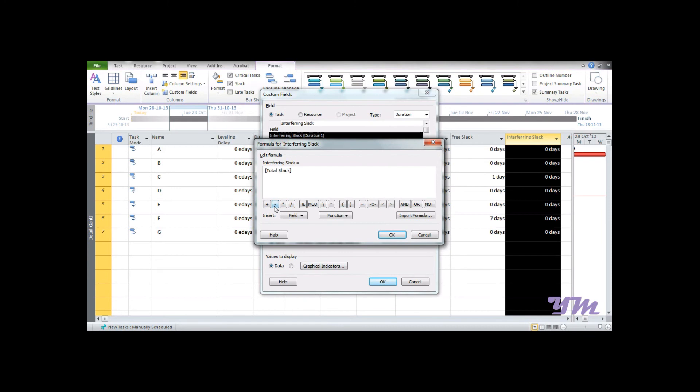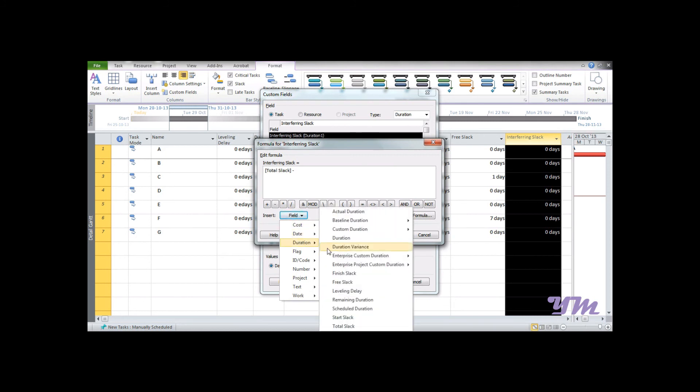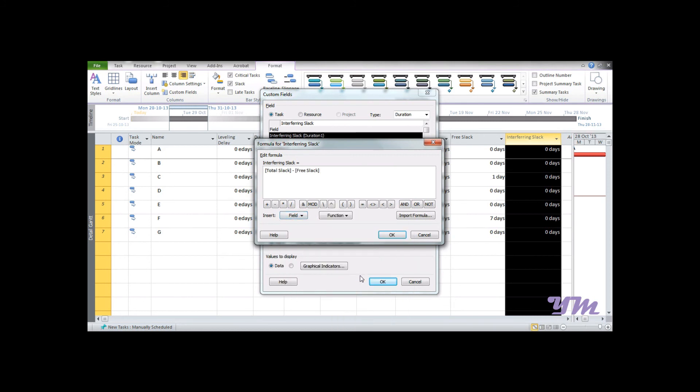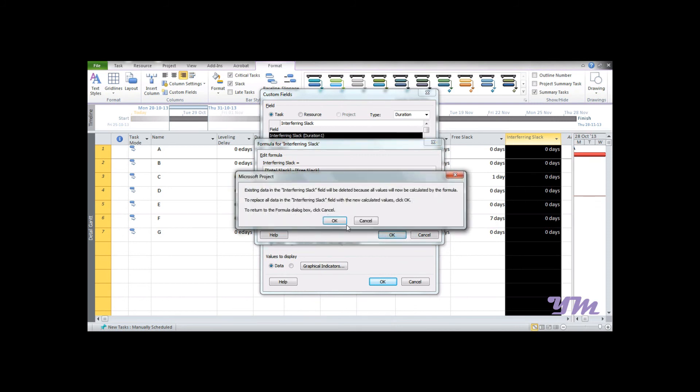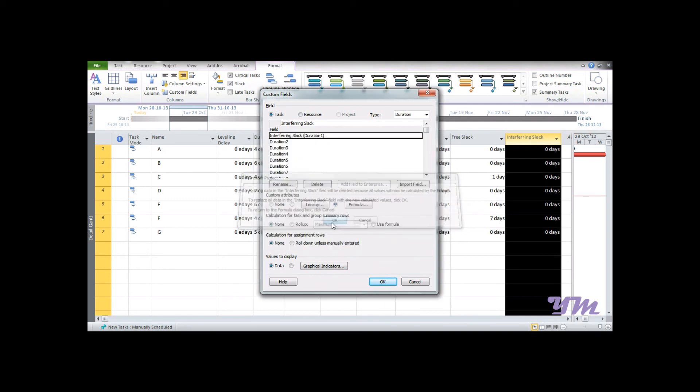Select the type of mathematical operator you want. As per the formula of Interfering Slack, it's Total Slack minus Free Slack. So I would again go to Field, Duration, Free Slack, and press OK. Just see over here what happens in this part.